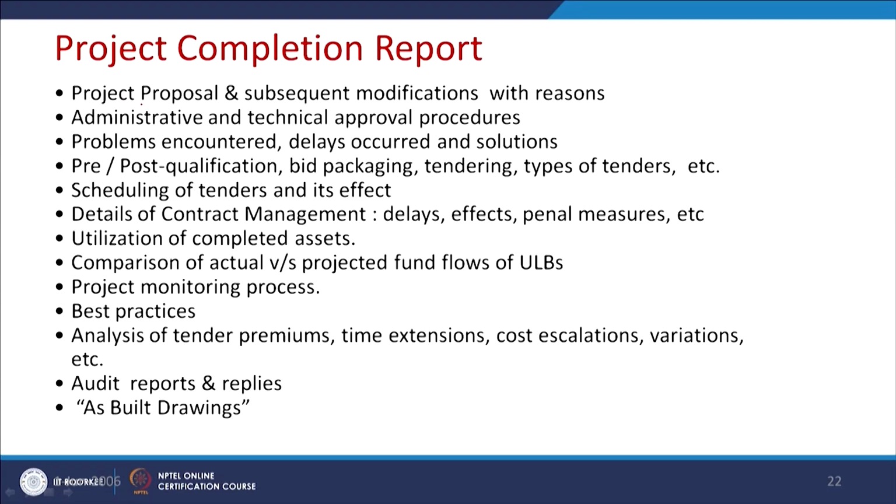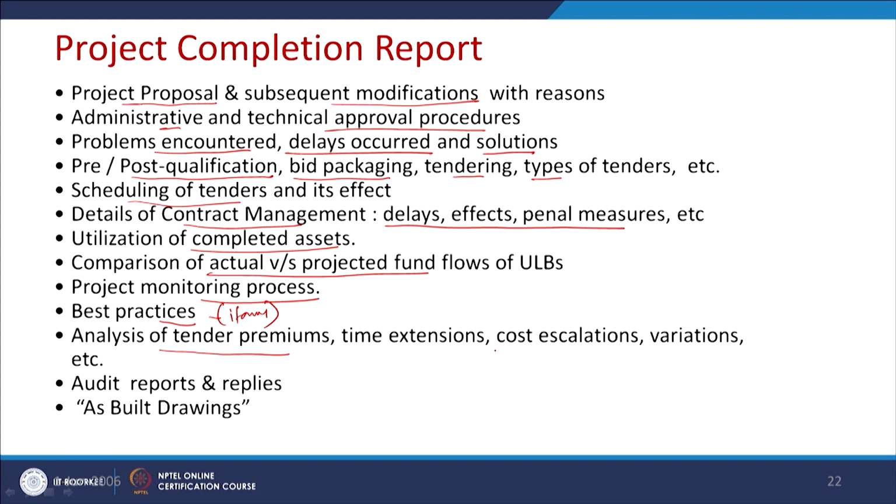It consists of the project proposal details and the modifications, administrative and technical approvals, then problems encountered, delays occurred and the solution adopted, pre and post qualification of the contractor, bid packaging, tendering, types of tender, scheduling of tender, details of contract management, if there is a delay, its effect and a penal measure, everything, utilization of the completed assets, comparison of the actual versus projected fund, monitoring process, best practices if you have adopted anything, and analysis of the tender premiums, what kind of time extension, cost escalation are allowed, then audit reports and also as built drawing.